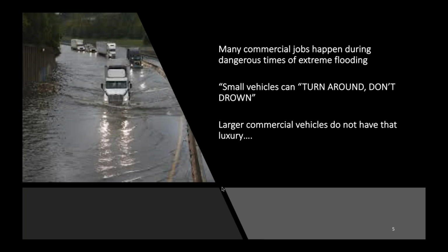They're hard to turn around in short spaces. If you get off the shoulder of the road when it's wet at all, you're going to be stuck. You're not only going to block the traffic and block the road, but you're going to have a huge wrecker bill. And then most importantly, you're going to be late getting to the job site. So these are easily avoidable by simply telling your drivers, hey, this route is a normal route, but it's closed, and sending them a screenshot of a map that's accessible that they can use to get around and into your job site.